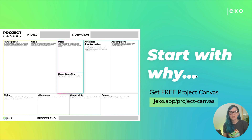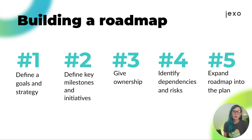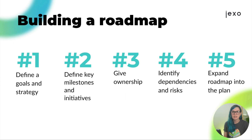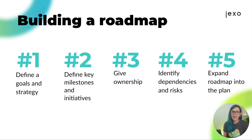Once you've defined your goals and strategy together with key milestones, you can start creating your own roadmap that you can then expand into a plan. One important point while creating the roadmap is to give ownership — make sure it's clear who is responsible for which initiative and that they have the right team to execute. The roadmap can then be used as a key document during your project kickoff meeting, and teams can use it to expand it into the plan.